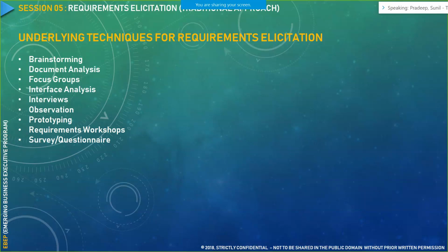There is a matrix called the requirement traceability matrix, which could be linked with all your system requirement specifications, your high level BRD, and all the individual requirements. You, being a business analyst, need to do the impact analysis if one SRS is impacting another SRS. We will cover that in an upcoming section, probably in the requirements lifecycle management section, when I explain the requirement traceability matrix.